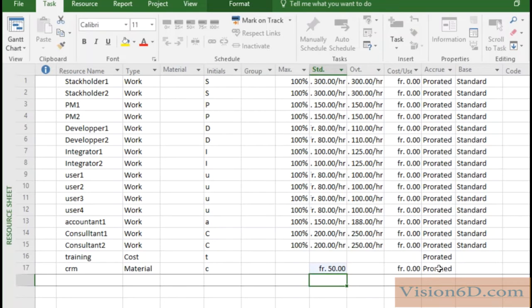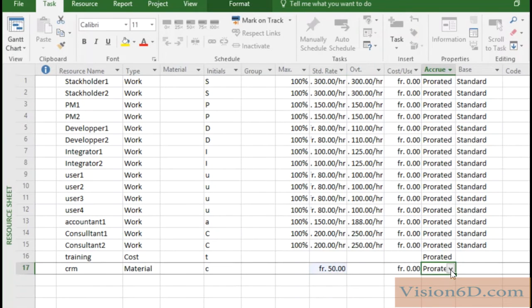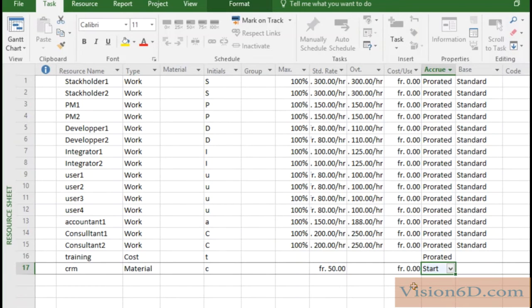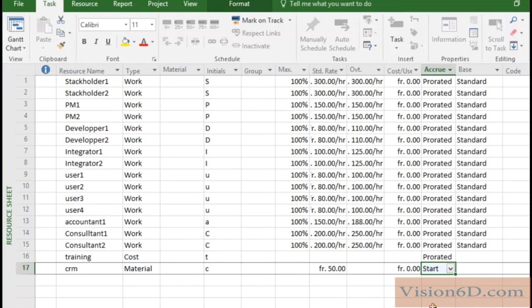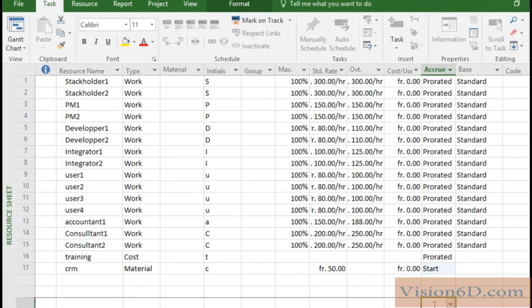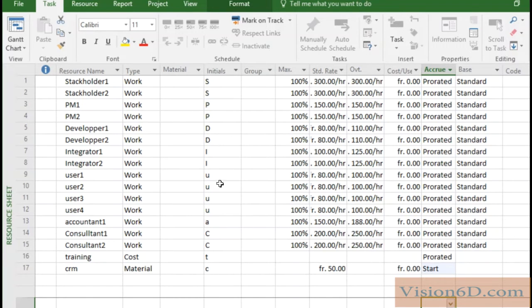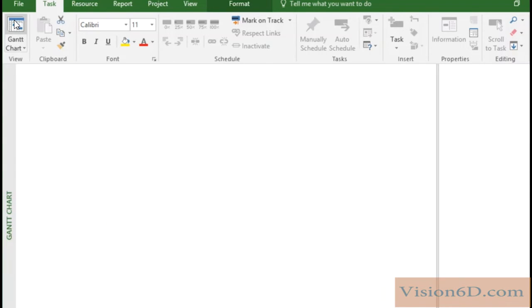And we can also say here into the cost that it has to be paid at the start. This is a case that we often find with licenses in the cloud for any application. So this doesn't really matter here, it's just for convenience. So once this is done we have now a resource which is of type material per unit it will cost 50. So we go back to the Gantt chart.